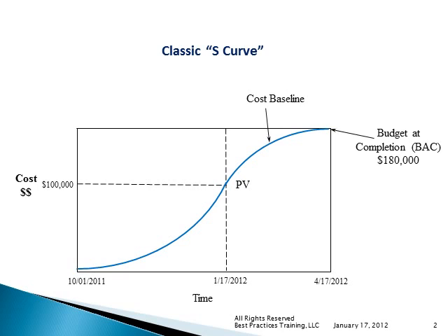Now suppose you've only completed 85% of the work that you had planned. So of all the different work packages that were planned to be completed at this point in time, maybe only 85% of the work has really been completed. So what you have earned at this point in time is 85% of what was budgeted, or $85,000 is what's been earned. That is your earned value at this point in time.